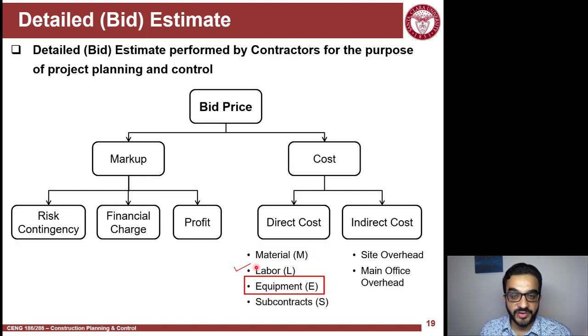So we're done with the labor. It's actually one of the intensive parts of a cost estimate if you're doing a detailed estimate. If you're doing a detailed estimate, this means you are hiring people, workers. You're not subbing, you're not outsourcing the work to subs. So it's a lot of responsibility, it's a lot of cost also to account for, and this is the right way to do it. Otherwise, you will base your estimate on bare costs and then find out you're paying all of this overhead. So it's very critical to account for the loaded labor rate instead of the bare labor rate.